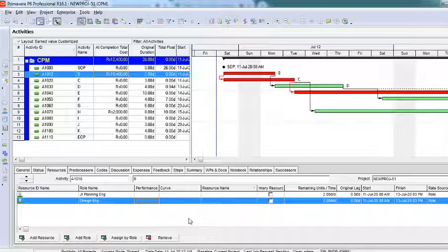In our industry, in our PMC, we can also measure the actuals of the human resources. I'll repeat: we can measure the actuals of human resources. That means if I say you should have worked so much quantity per hour, and after completion you tell me how much you have done, based upon the amount of work we can compare and tell you that you have so much productivity, actuals of productivity. Based upon that, the review for salaries or whatever, the accountability happens.